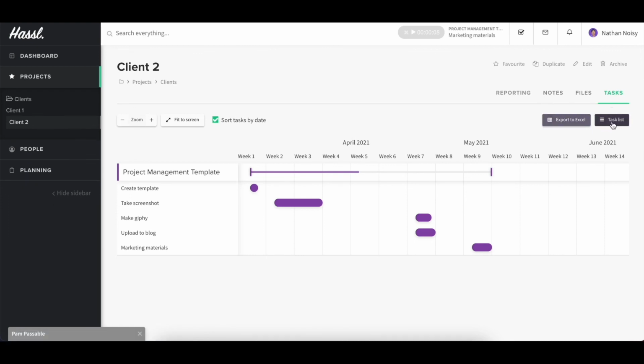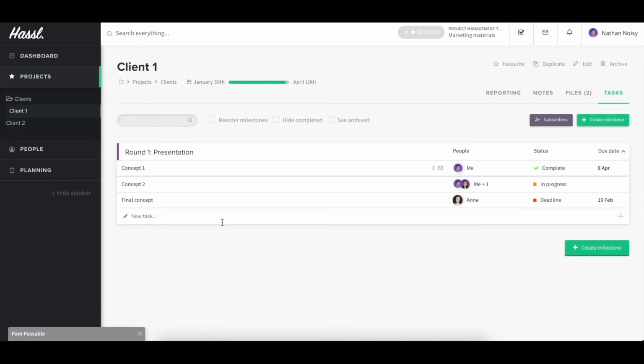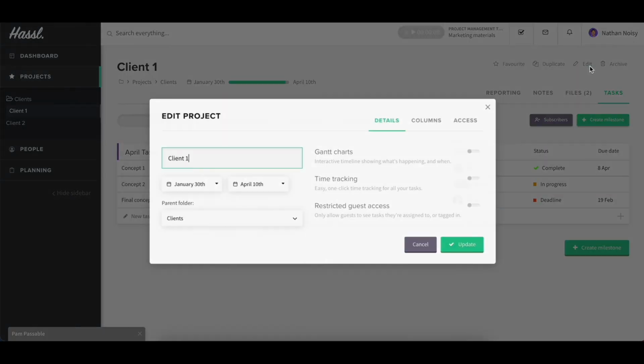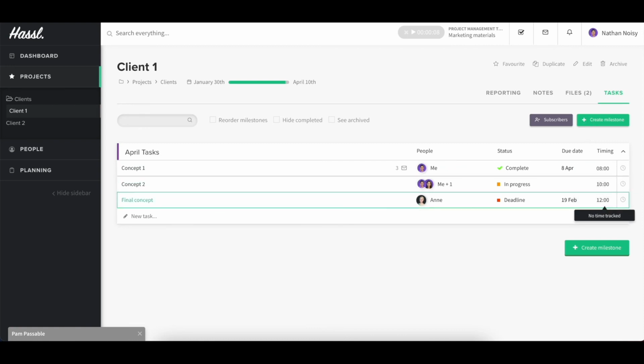So it's entirely up to yourselves whether or not you have individual milestones as activities or months. A lot of people will set it up for retainer clients as a milestone would be, for example, April tasks, and this is everything you're doing for the client in April. It also forms a really great way if you have time tracking on and you do it as monthly for clients. It makes it really easy to invoice the client and then let them know how many hours you worked on the project. So really transparent and allows a lot of accountability for anyone working at home.